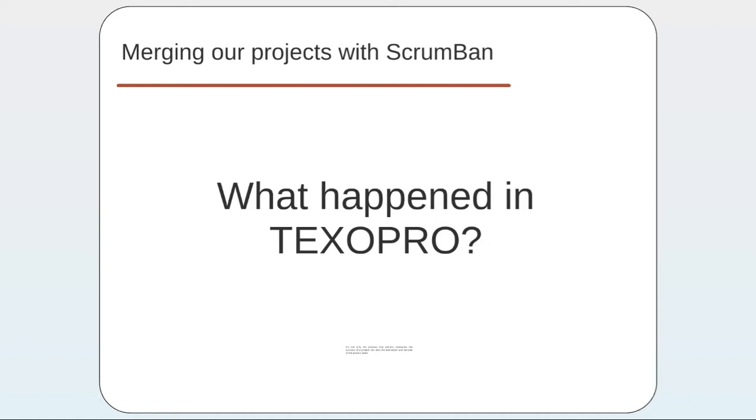Likewise, there were some urgent requirements, and some PBIs were created, and they said these PBIs were very urgent. For example, let's say we were in sprint X and we had already passed 1 week of that sprint, and there were 2 more weeks to finish it. When we were told that we needed to take those new PBIs into this sprint and do them as soon as possible, as a very devoted Scrum team, we said no, we can't take those PBIs into this sprint, but we can do them in the next sprint.